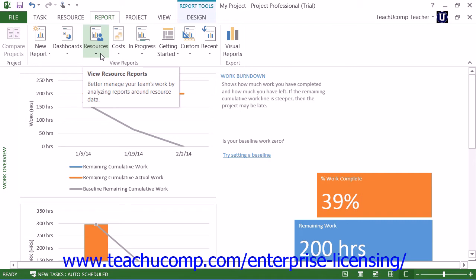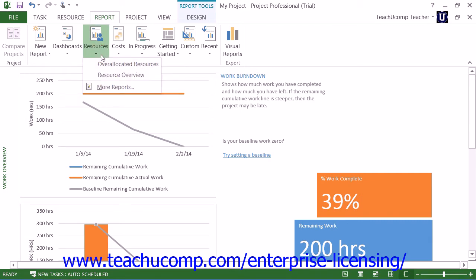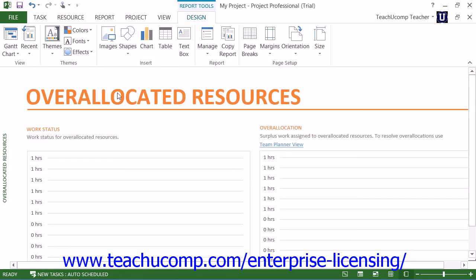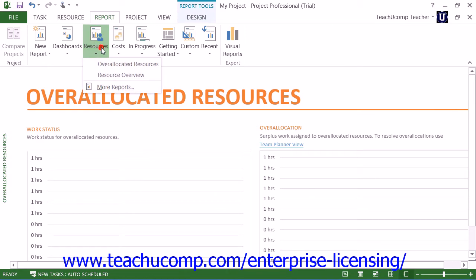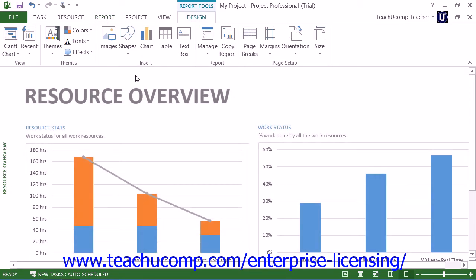Under the Resources reports, you have Overallocated Resources, which shows the work status for overallocated resources, including actual and remaining work. It is used to aid you in resolving resource overallocations. Also under Resources, you will find the Resource Overview, which shows the work status of all work resources on the project. This report is used to determine the work completed and work remaining on a project.